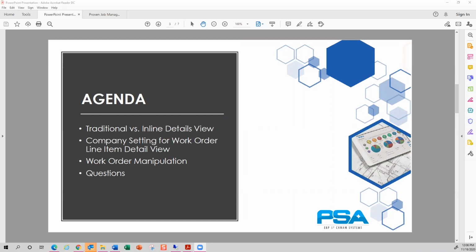And the work order system is designed specifically to budget and record what your sub-trades should be paid for the work that they're performing on your project. So overall, work orders are used to budget your project in terms of gross profitability.